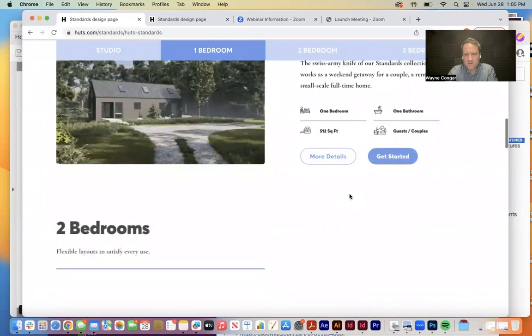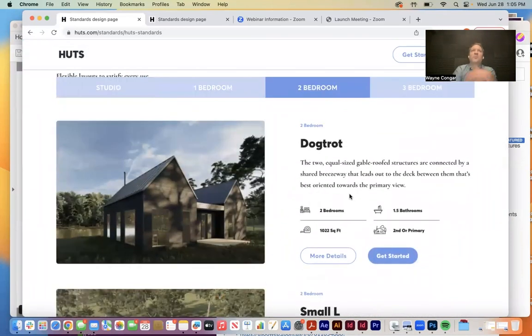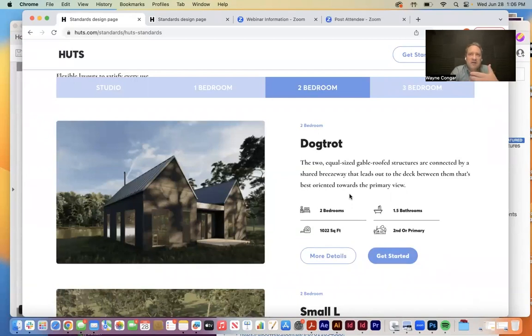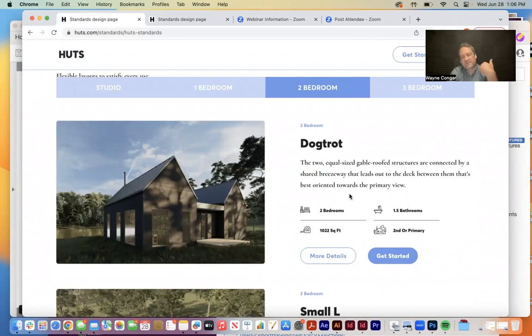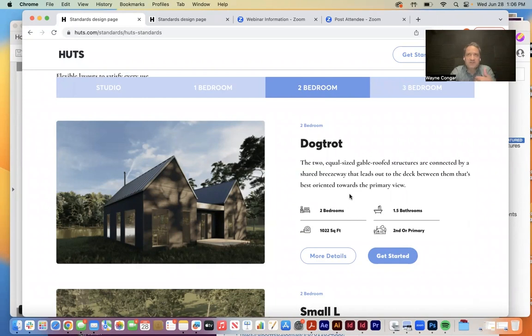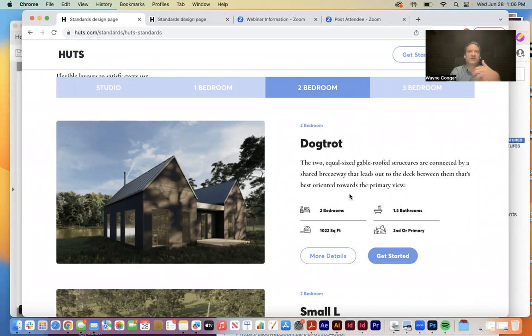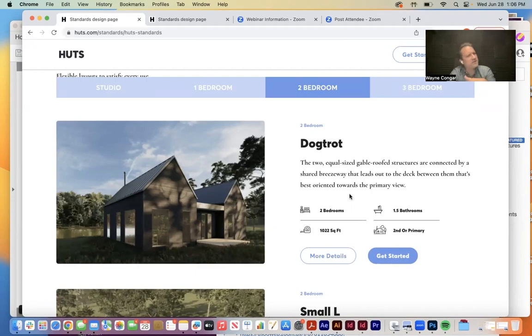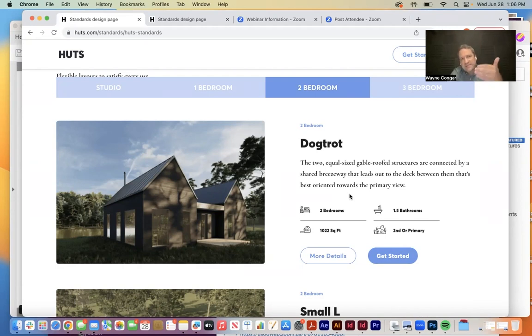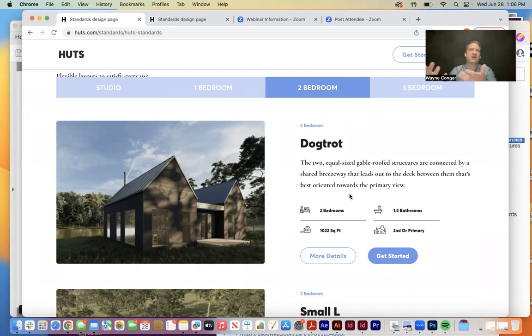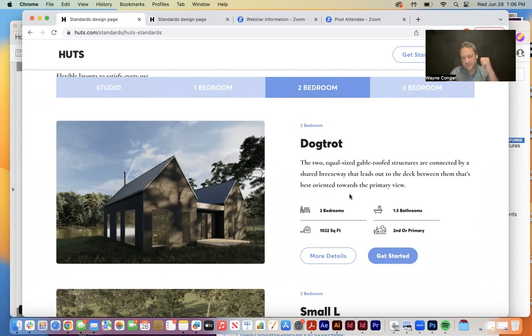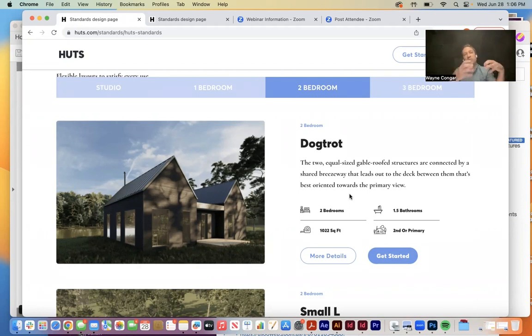And so what our standards are, are really home products, more than just plans. They are fully documented design types and home types where we've worked out much of the structural engineering, we've worked out much of the mechanical approach, much of the specifications, in a way that allows us to know market by market, location by location, a lot of the pricing that goes into the construction pricing that goes into the house. And this is a major difference from, say, if you were to work with a custom architect who might be working from a blank page. They have to go through a design exercise and a pretty detailed one before they can solicit from a contractor a bid that tells them what this thing costs.